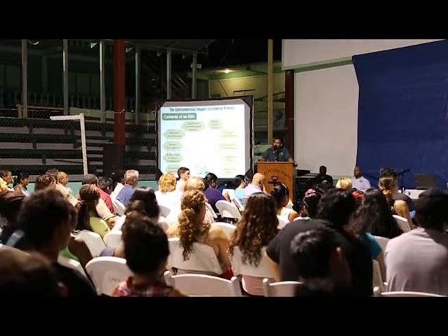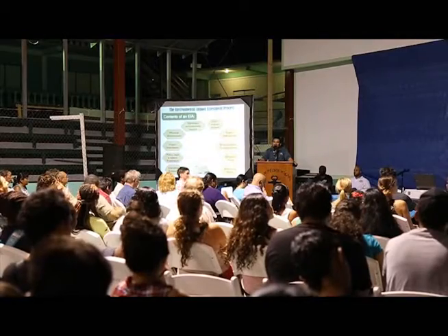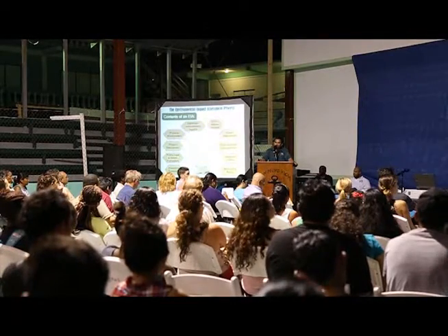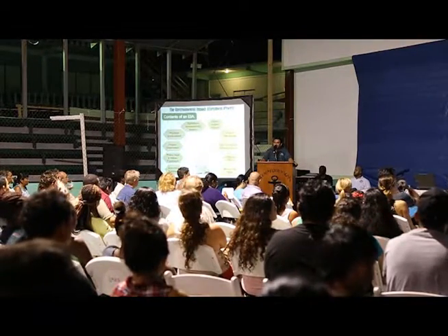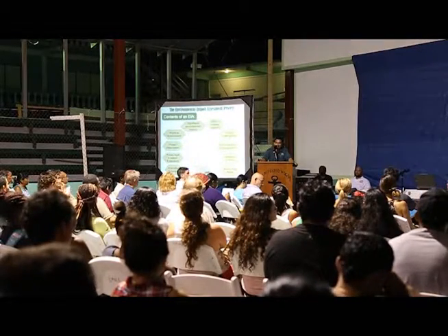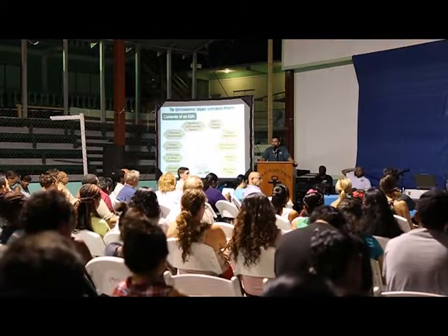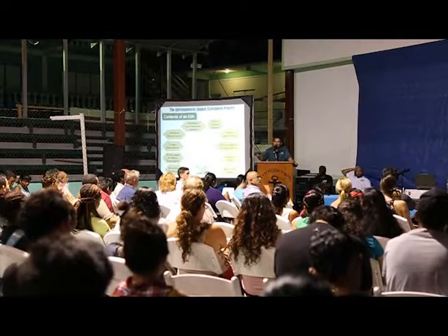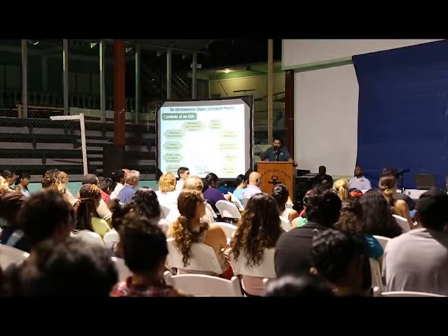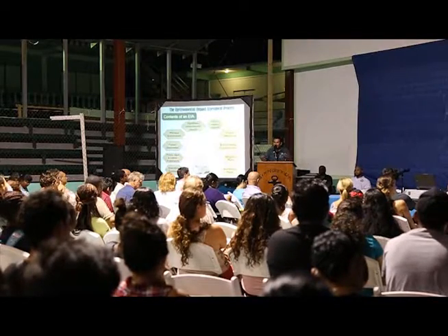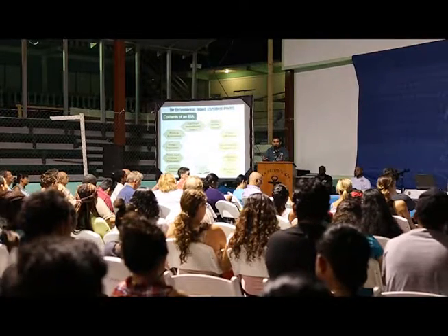A key component in the environmental impact assessment process in developing one of these reports is looking at the project alternatives. And this includes the non-action alternatives. What would happen if I do nothing? And it's compared to what are the benefits or negative impacts of what I am proposing. And it also asks you to look at other alternatives. What if I was to do another design, another development project of a different nature within that same location? So it requires you to look at the various options and to weigh the benefits, the pros and cons, and then make a more environmentally sound decision of what type of development would go out there.